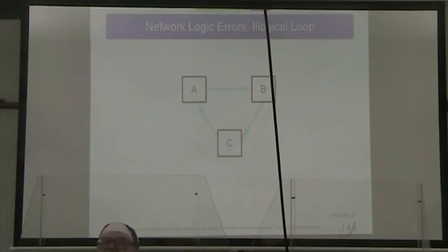So when you build your network, be sure that you're putting it together correctly, that everything, except for the beginning and end activities, has to have at least one arrow coming in and at least one arrow coming out. Okay.